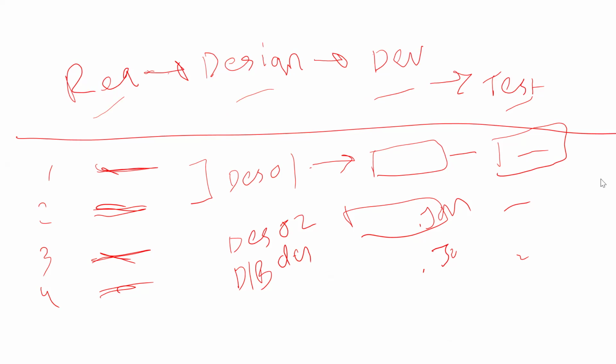Yes, they might be entering it there, but because it is probably simple, Kuldeep, Shishir, this requirement is getting captured at 9 a.m. and the product is getting delivered at 5 p.m. Correct? Now, if you are going to capture the requirement in the month of February and deliver the product in July, there are bright chances you will forget one of them, or your team will forget something. Correct? So the best way is to use such a chart, and it's called RTM, requirement traceability matrix.